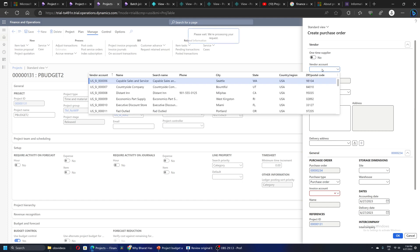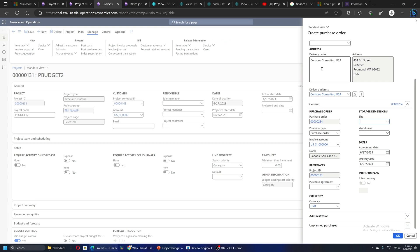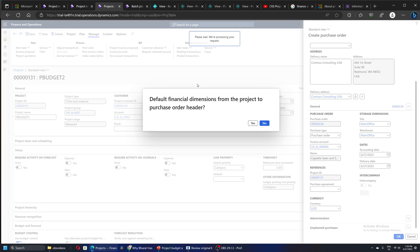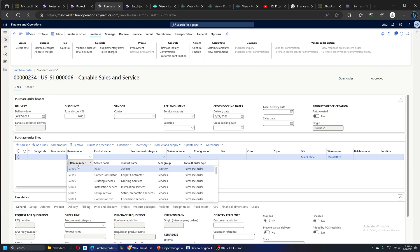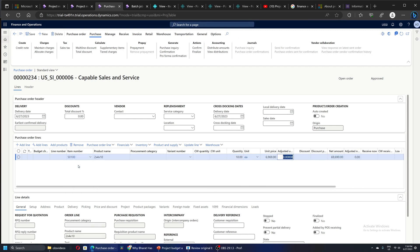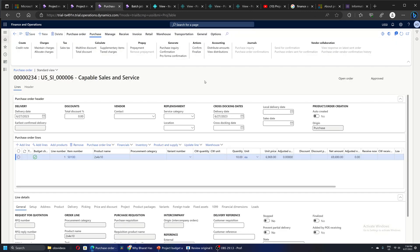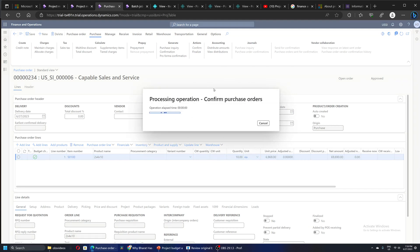I am going to create a purchase order for this project. This is the project order we are creating - I will take the same item, let's say I have chosen 10 quantities of the item on the PO line. In the financials I will perform a budget check, and then go and see the project budget status. We can see that for this project and for this item line, the amount is this much, the remaining budget amount is this much, and the budget defined - so this is okay. Next let's confirm this PO.